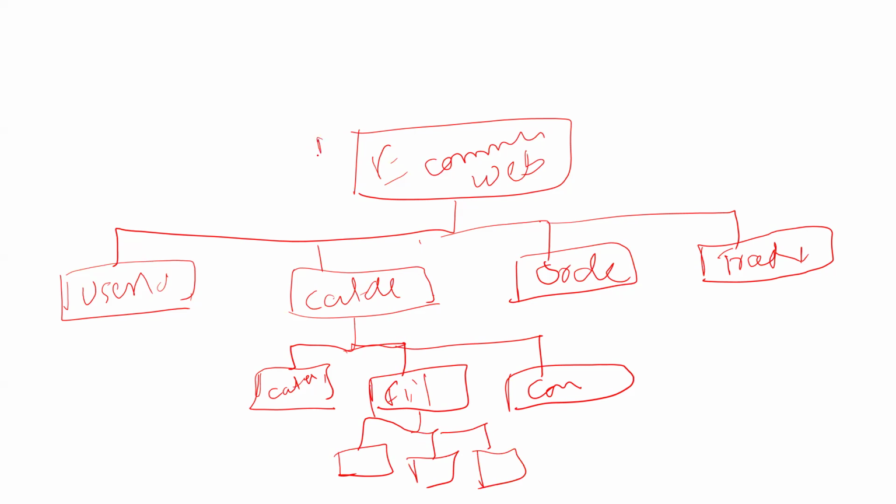They call the top one number 1.0. Below it they call 1.1, 1.2, 1.3, 1.4. Under 1.2 they will call 1.2.1, 1.2.2, 1.2.3. Under 1.2.2 they will call 1.2.2.1, 1.2.2.2, and so on. This numbering is what they give. Understood so far?